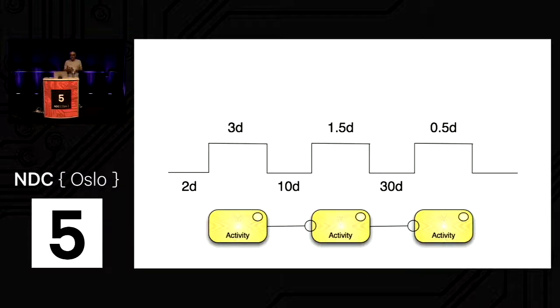But then you've got this 42 days where the work is sitting somewhere waiting for work to be done on it. So even though only 5 days of work needs to be done in this case, and say this piece of work was going to make you $10,000 a day, you end up with 42 days worth of delay. So you can imagine you've lost all of that money. If you could have been making 10 grand a day for 42 days, if you just optimize what you're doing.